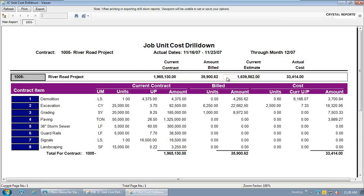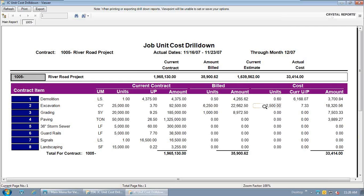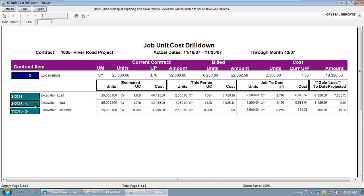So as I drill in, I'm going to get into each different pay item, and I'll see those values coming across the top. So our contracted rate for 25,000 cubic yards of excavation was $3.70. To date, I can see we've billed a little over 6,000. We've only taken out of the ground 2,500 here, but its cost is $7.33. So that type of comparison is based on that structure that we pulled through from Hard Dollar.